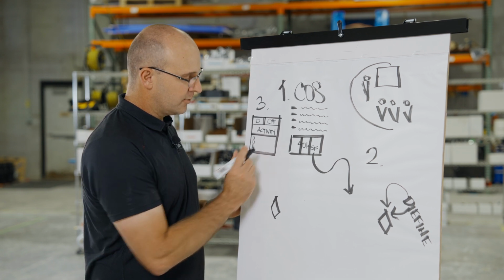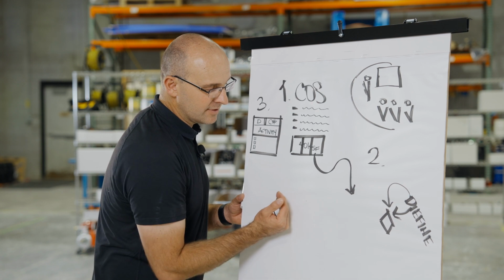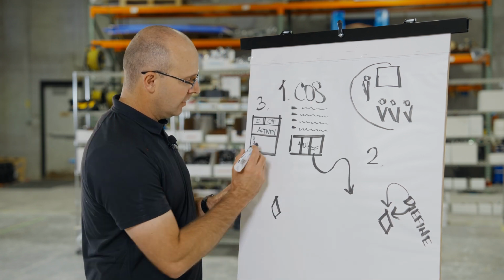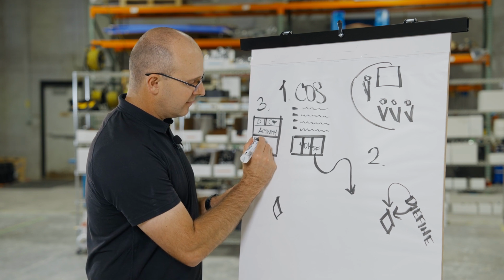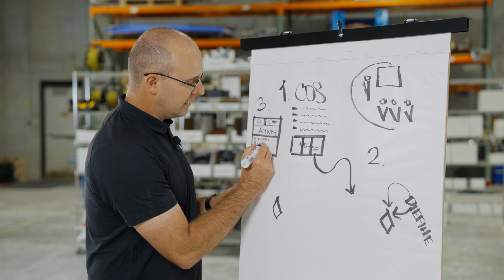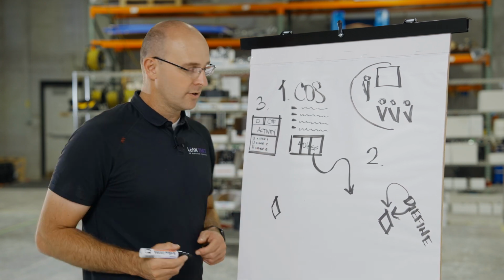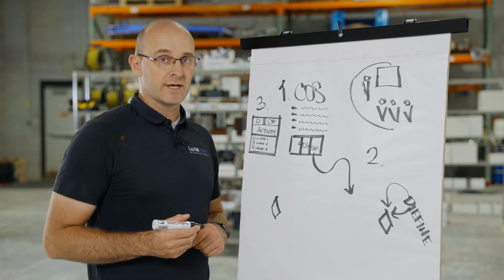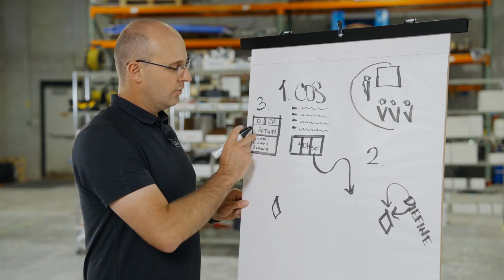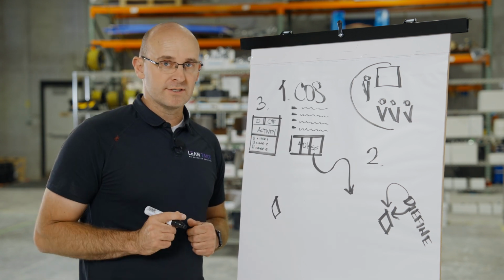Remember, they call it pull planning, and we go backwards because we are establishing activities backwards based on need, which gives us that third dimension. So if I say, hey, I have this need, I'll write this in here as need number 1, need number 2, need number 3. Some people call them constraints. They can be called predecessors, whatever you want to call them. The bottom line is, for this activity, we need to have these done, and you put a check mark by it. I'll show you why in just a second.